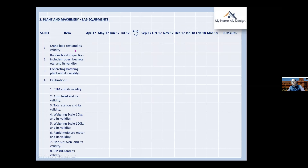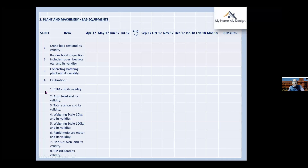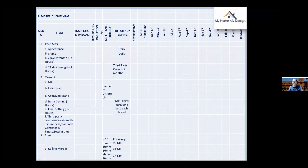Calibration is important for: compression testing machine, mixing machine, auto level controller, total station, weighing scales (10kg and 100kg), rapid moisture meter, hot air oven, and ARM 800 — all with validity dates. This material checking chapter is a favorite — each and every material for the project must be examined through testing. After testing parameters are satisfied, only then can the material be accepted. The quality engineer has every right to reject material not meeting quality standards.